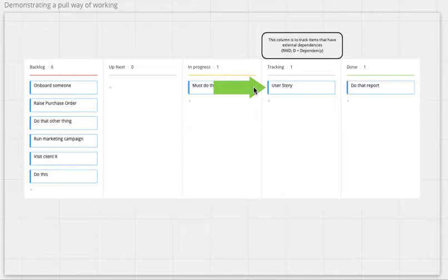Is this an escalation? If you're using Scrum, the team might want to escalate to the Scrum Master because it's been unable to unblock this item itself. Or maybe just leave it there. Maybe you need to wait three or four days to get what you asked for. So you have a conversation about this. What needs to be done on this over this next 24 hours? Leave it there. Was it unblocked? Did it come back? But let's assume that it didn't.